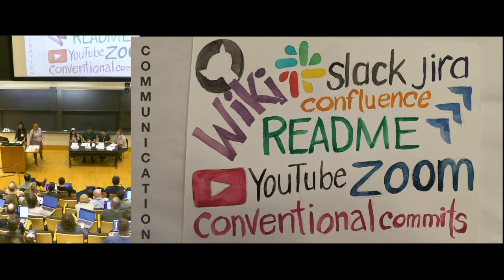You'll want to sync with me if you have any questions while you're working, and then I'll review it once you feel like it's done, so we can sign off on all the visuals and behavior. Then let me know that you're done, and I can give you a code review and suggest any changes. Once that's all set, we'll run the Percy check and the pull request and merge it into the code. Good to know. How about handling unexpected changes?